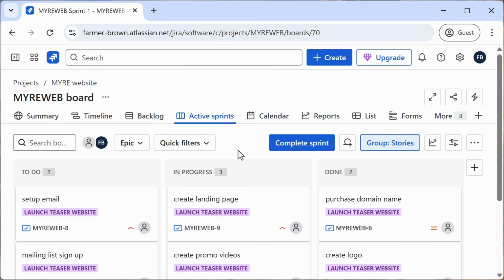Here's a real-world example where bulk edit might be useful. Let's say a sprint is canceled and all 12 tasks need to be reassigned and downgraded from high to medium priority. Instead of opening each issue, the PM selects all 12 issues, uses bulk edit, and they're done in under a minute. So to recap, bulk editing is essential for managing large numbers of issues efficiently. Always use filters to narrow down your list carefully. Use with caution, especially for deleting or transitioning.